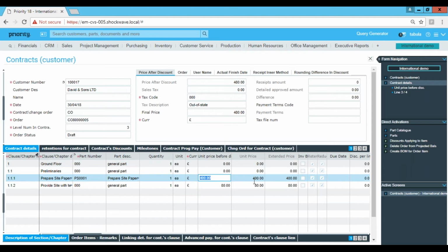And once you're happy with this, something very important here is how do you do the application of payment? Do you apply by percentage, by telling them I have completed 50%, or do you do it by number, by saying I have finished 0.5 quantity of this? In most cases, most of our customers do it by percentage performance. So they will say, I have completed 50%, instead of saying I have completed 0.5 or 0.25.